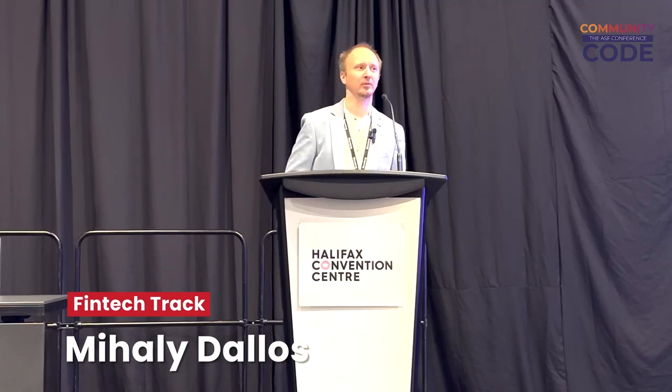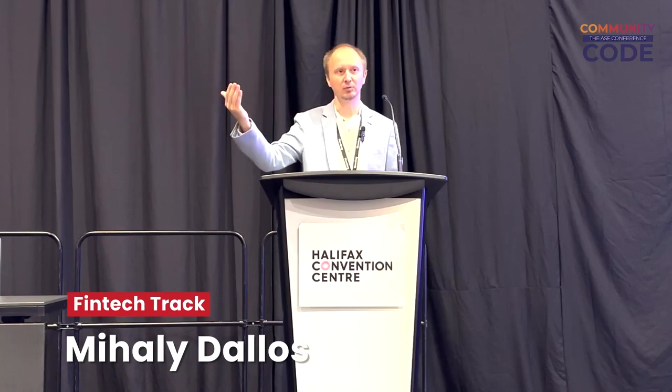Good question. So the question was how much the SAFe methodology and the incremental planning helped by phasing it right. My answer is that the iterations SAFe has should be aligned with the business iteration a company has. Usually that's when chief executives define strategy and have visibility on the next quarter. It's usually one quarter because a publicly traded company has quarterly reports that give the cycle of this quarterly planning in SAFe, although it can be different. In our case, by the way, we learned that it was a bit different.